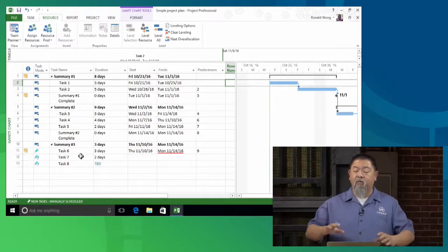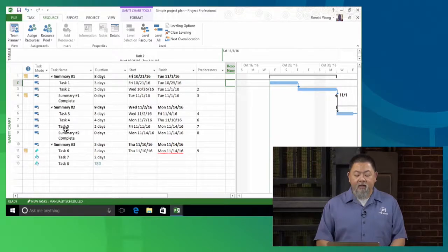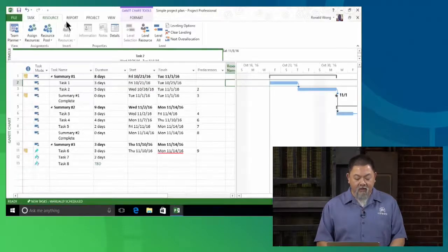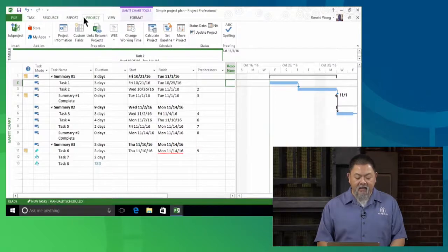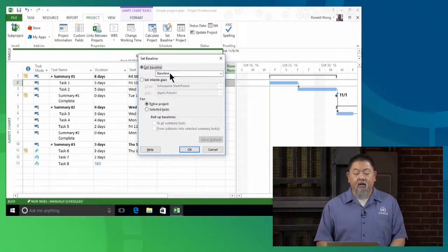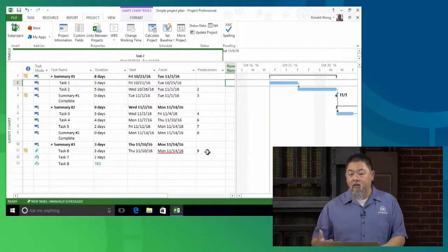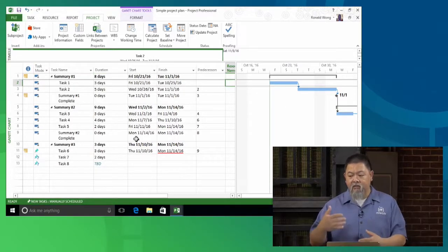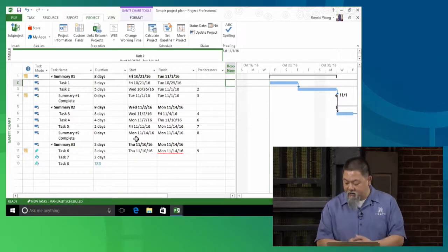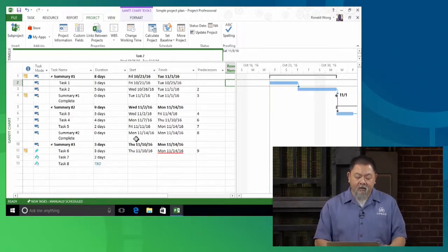And once you have that set up before any work is done during your planning, then there's a way inside Microsoft Project that you can take a snapshot of this entire project and set it as a baseline, okay? So here, let's say that this is the baseline. I click set, and now I create a baseline. Once my project starts being used, I can create a report based on the baseline versus the actuals as I update all of these durations and the time elements involved. Okay? So there's a lot of information that we can take a look at when we start to do this.